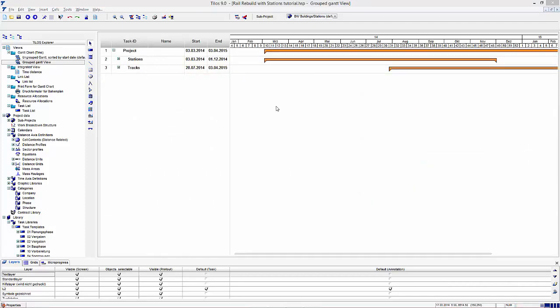The headline group Gantt displays the structure of the WBS visualized by the grouping summary tasks. This is done down to 4 levels. In this sample down to the phase level. All tasks are collected and displayed in the related superior hierarchy group element.